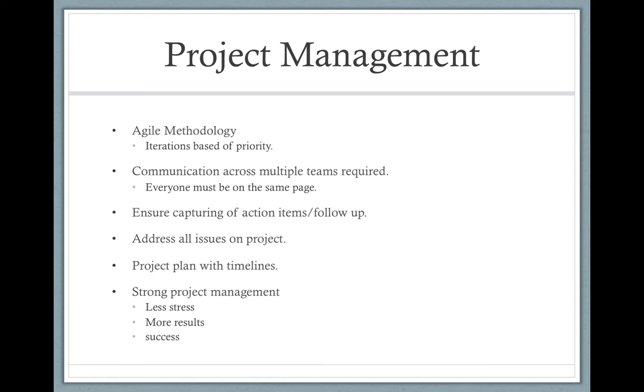After the session is over, they again walk through all the action items to ensure they have collected the correct information. The following day, before the next sessions begin, the action items are walked through again and status updates are taken. Project managers also do the necessary follow-ups on their own for project level concerns.